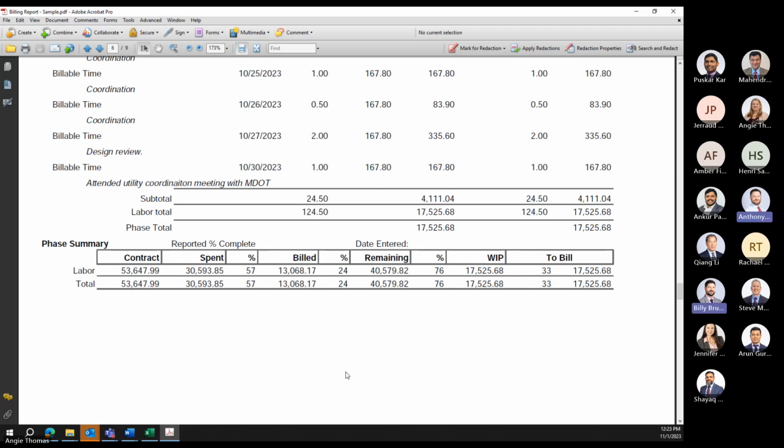Can I add to that? It seems to be more of a problem when the original job assignment sheet is set up. You have a water resource budget, a structural budget, a highway budget for each phase. That works. But let's say 8 months after the project is submitted, there's an EWO number 2, and that comes as its own phase.